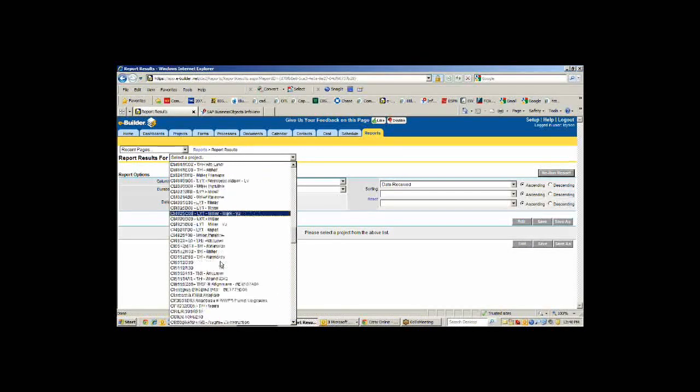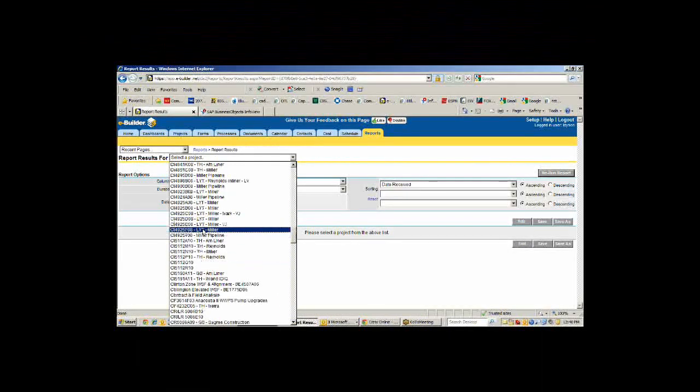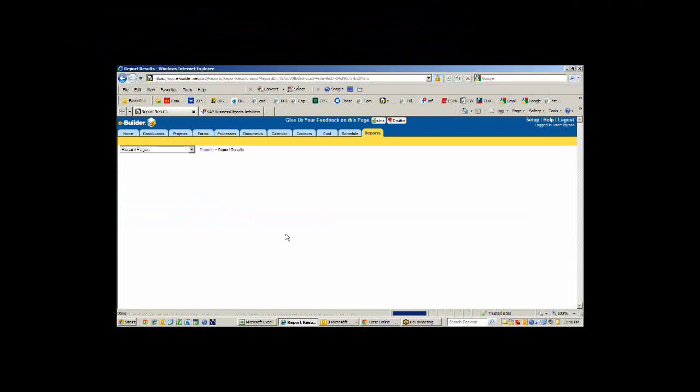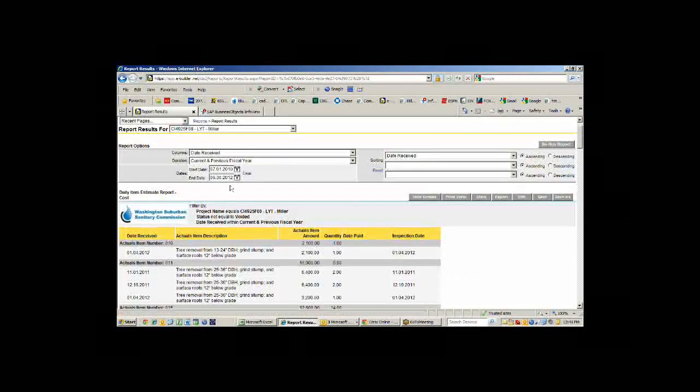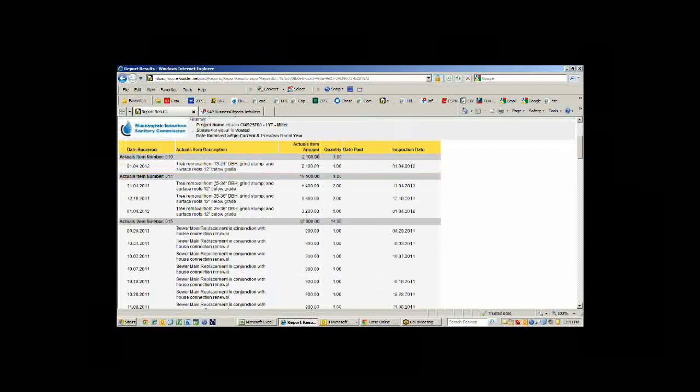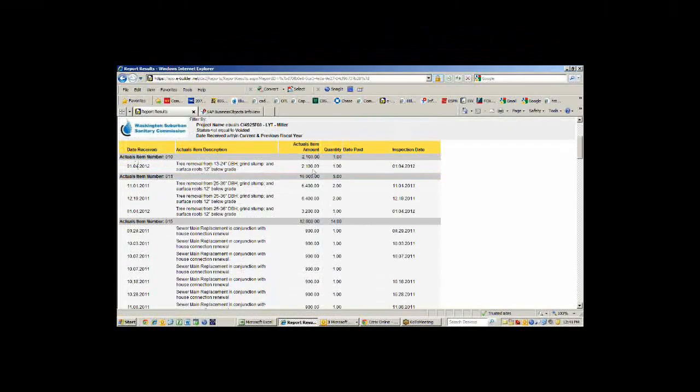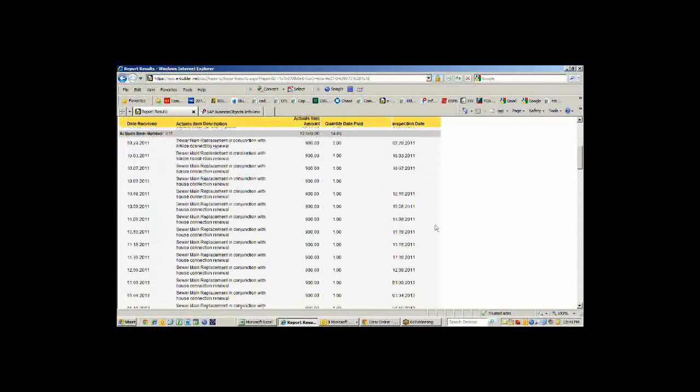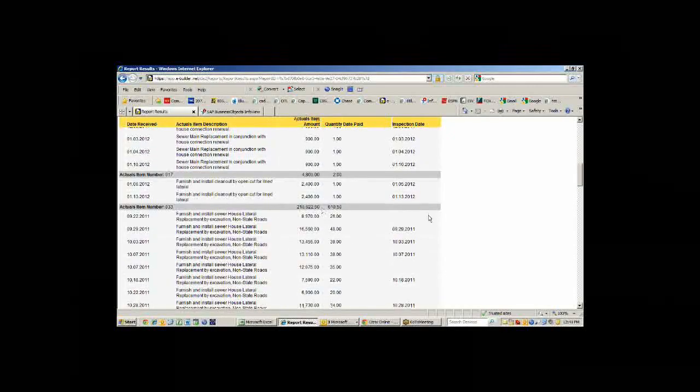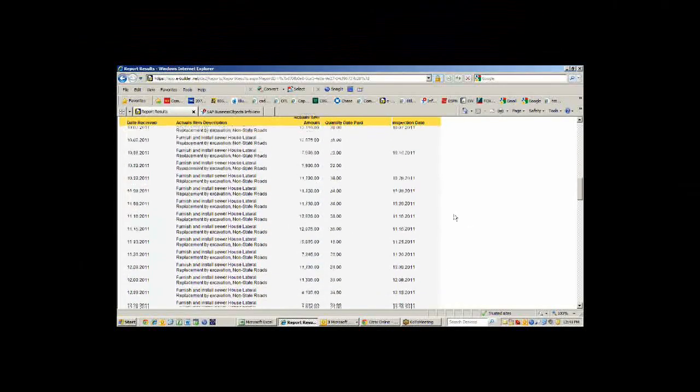I can pick that same project. I can go in here and say that I want to see everything from July 1st, everything for this fiscal year, and it will show me exactly what has been installed on this job and how much money I've spent on each one of these line items.